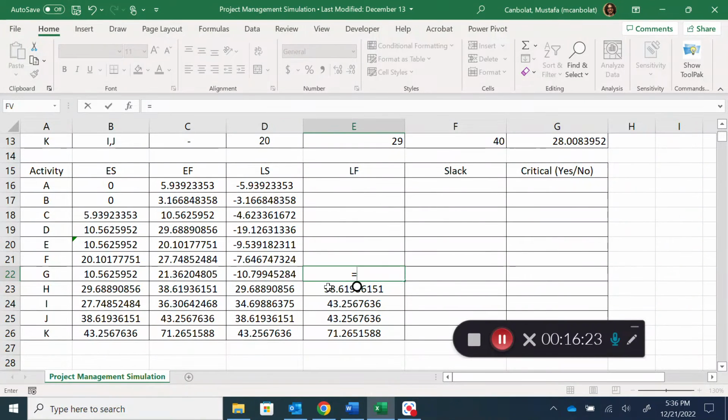So there are two. In that case, I'm going to take the opposite approach here. I'm looking at H and I, so there are 38 and 43. What I would do is, if I just delay G by 43, I wouldn't be able to start H on time, right? These are the finish times actually, these are the start times, so 29 and 34. So not 38 and 43.